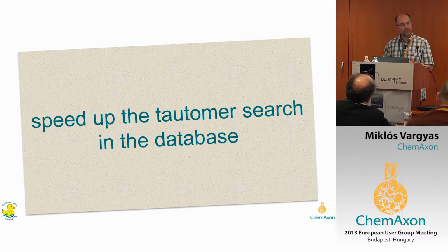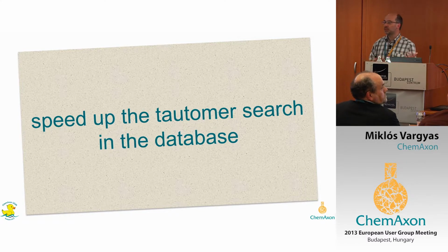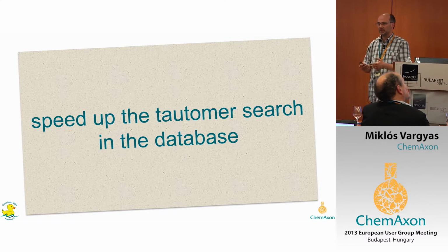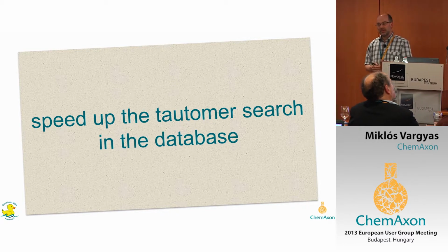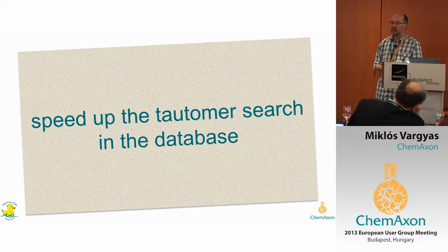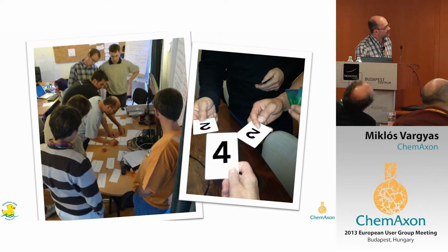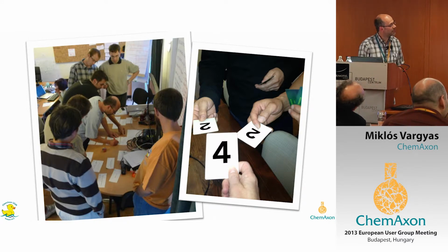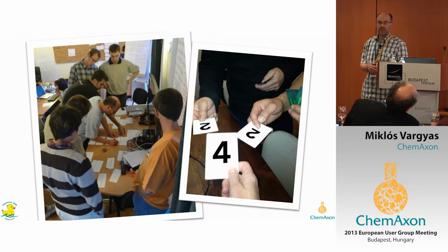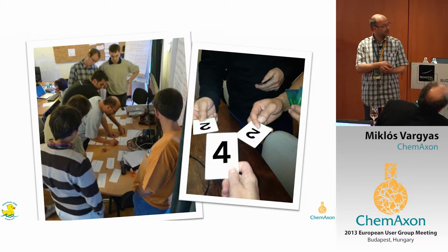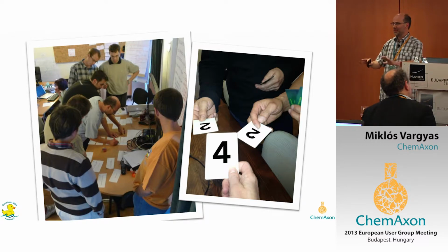Now, after some discussion, which happens in the so-called planning meeting, where the product owner brings this story to the team and they discuss the goal of it, the team provides a so-called size estimate. Typically, this happens in a planning meeting, where the story cards are laid on the table. The way we typically give size estimation is called planning poker. Yes, we play poker. See? That's fun, real fun. No mess, no violence.